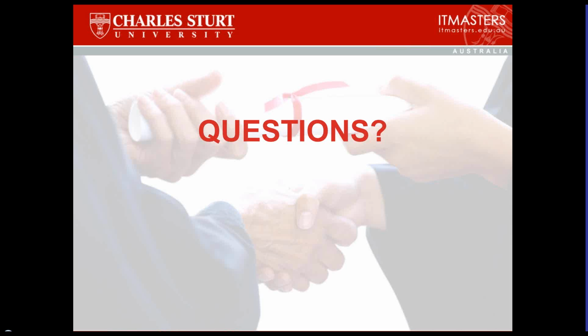And yeah, you may very well have a complete set of Envision documents and information and decisions pertaining to a release. And then you might do that again in a different context for a separate release that's going to be subsequent. That would be, I think, a clever idea and a good thing to do. And it really does depend on how big your releases are, etc. But certainly compartmentalizing those important milestones, very useful, because the end of a release is a very important milestone. Need to be clear on it. So, next point.